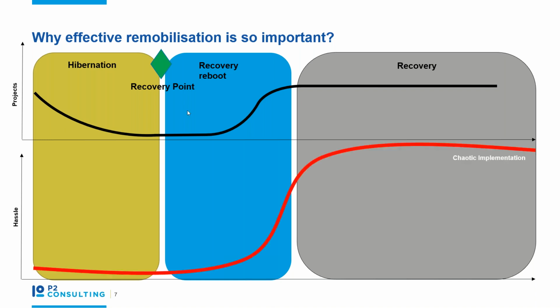So what you need to really be trying to avoid is a situation whereby there's very little thought and we charge into standing up all our projects. One really easy example we give is the simple example of logistics. You imagine you stand up 10 projects, 10 people on each project, 100 people trying to stand up over a period of a few days, all trying to get logins, all trying to get laptops. It goes without saying that that is an absolute disaster, and you can very quickly lose a lot of time